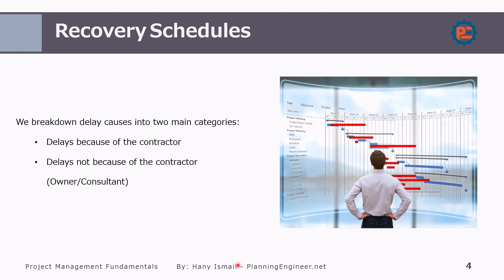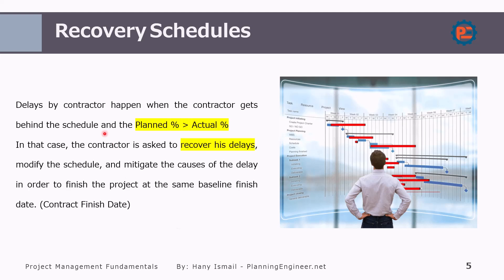We break delay causes into main categories: delays because of the contractor, and delays not the fault of the contractor — it could be the owner, consultant, or some other reason. Our recovery schedule should be created whenever a delay is caused by the contractor, specifically when contractors don't follow the plan.